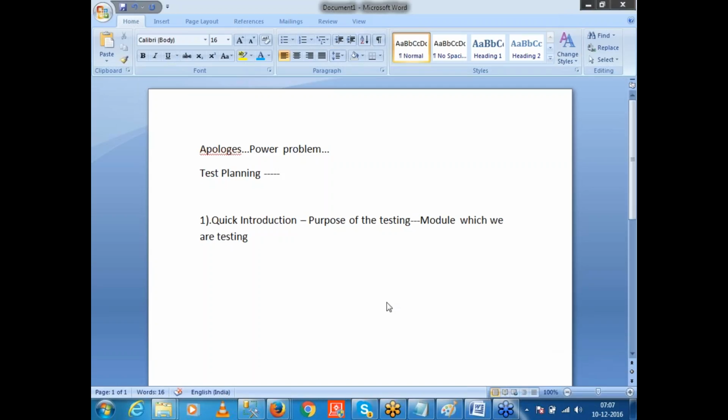In a matured model, you will have the requirements defined, and then unless and until the test plan is created, in a few CMM level organizations, you are not allowed to proceed. Or if it is agreed well before, then we can continue writing test cases.